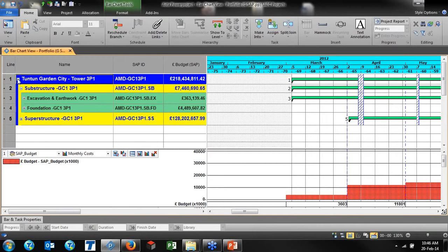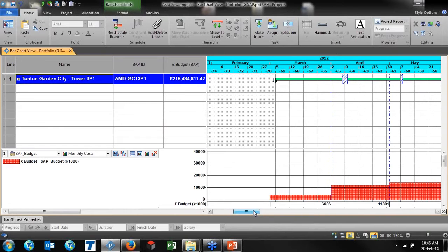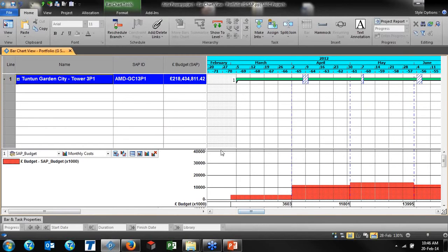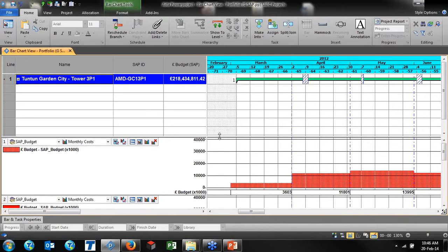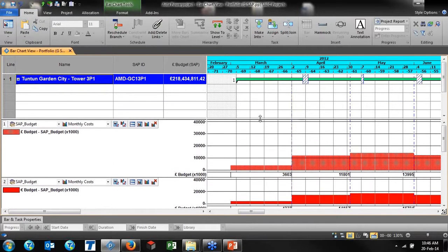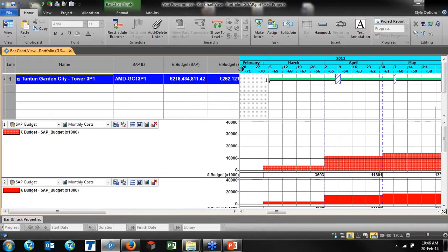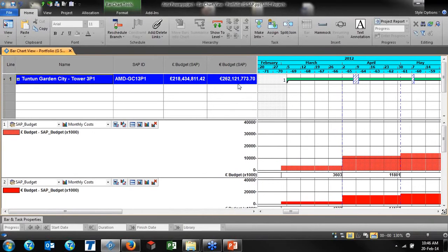And here, the total cost for my project, and it is here now. And this is separated into months. And now, please see that for the monthly, I am able to see my costs. And when I look at the overall like this, in the March cost, April cost, May cost. And also in what we had in the pounds, but we can also show in the euros.